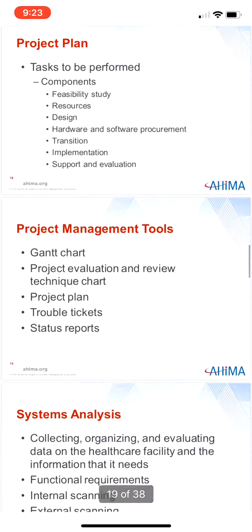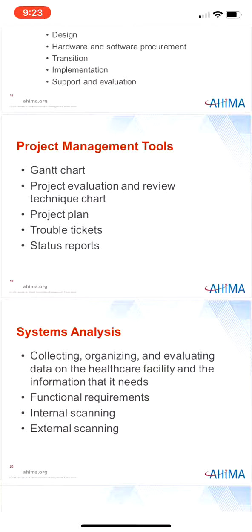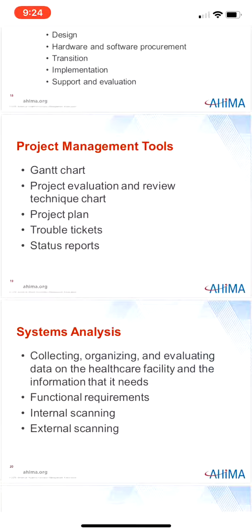A number of tools can be used to control the project. These tools include Gantt charts, project evaluation and review technique or PERC charts, project plans, trouble tickets, and status reports. A Gantt chart is a project management tool that records specific tasks, their start and end dates, the person responsible for the task, and any connections between tasks. The Gantt chart — you can see an example in Figure 4.2 — can easily show which tasks are behind schedule, which are on target, and which are ahead of schedule.